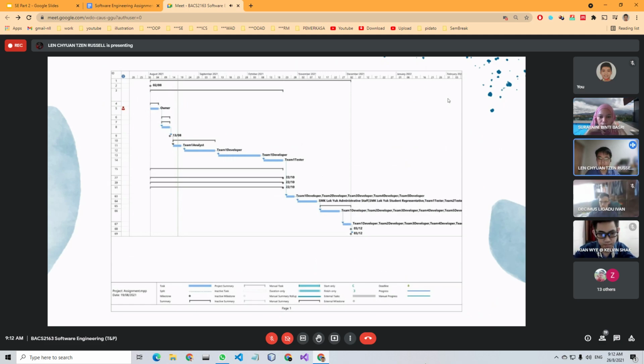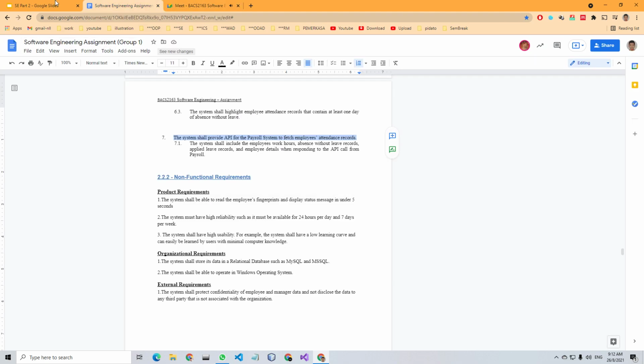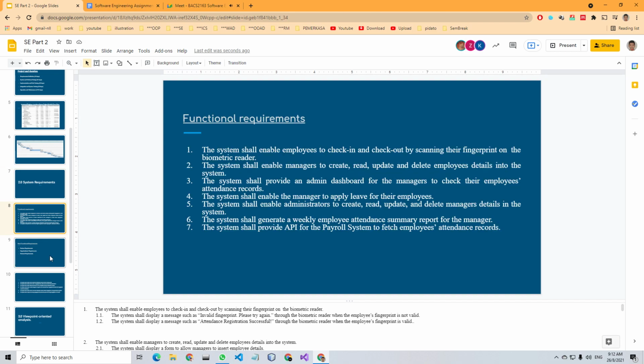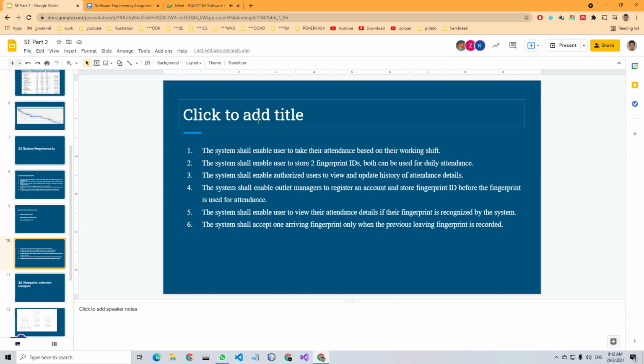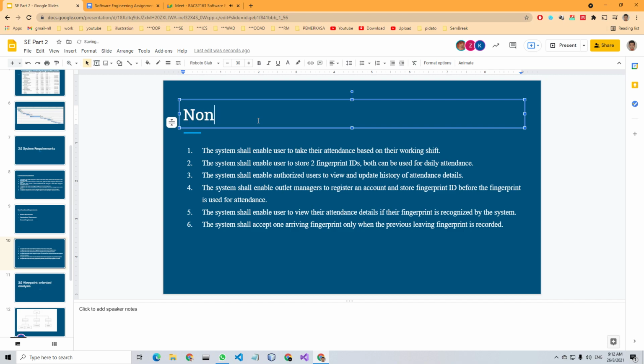We are using the RAD software process model, and in this Gantt chart, because we can't capture everything if the modules are expanded, you can see that line 3 until line 14 is one module, and lines 15 until 51 are collapsed modules. So all these modules occur at the same time.